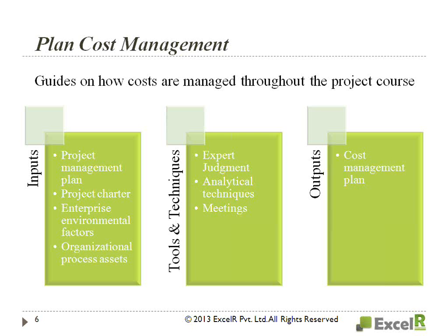When do you report related to the cost? Is it on a weekly basis? You inform all the stakeholders on the progress of your status of your costs, or is it on a monthly basis? Is it on a yearly basis? How do you do that? What is the frequency of audit you do? So somewhere in the middle of the project, you have to go and check whether you are as per the plan pertaining to cost or not. So when do you do that? Everything you will plan upfront here.